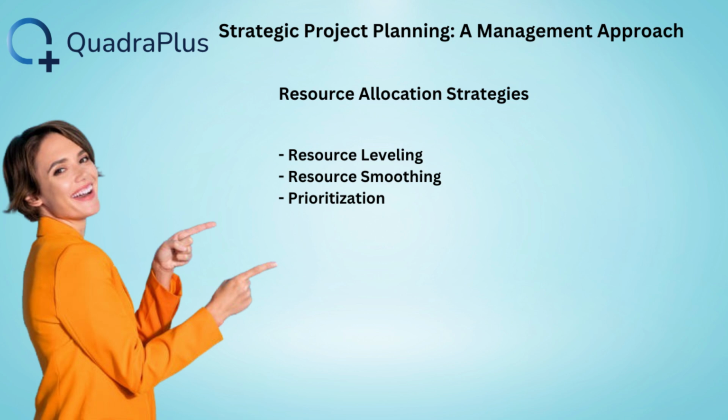Example: construction resource monitoring. A construction manager regularly checks the availability of heavy machinery and skilled labor. If certain machines are being underutilized, adjustments are made to reassign them to high-priority tasks.